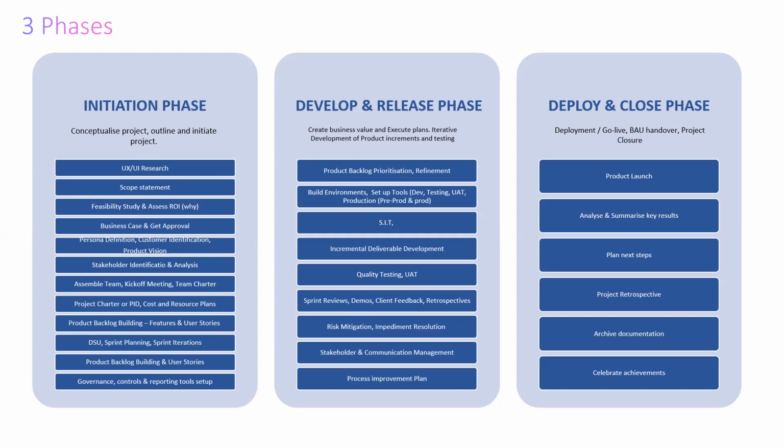And within your PID, you have other things. Your PID is like a folder. Your PID is not just a document, it's a folder. Within your PID, you would have your communication plan, you have your risk management strategy, and so on. Your PID is like you are saying, this is how I'm going to manage this project as a project manager. But you keep it to yourself to be guiding you.